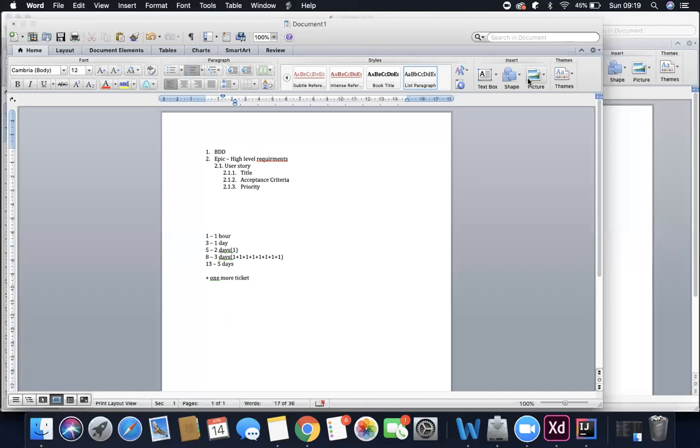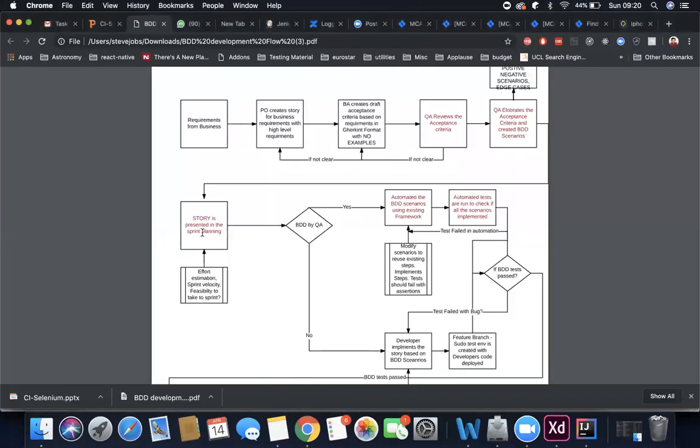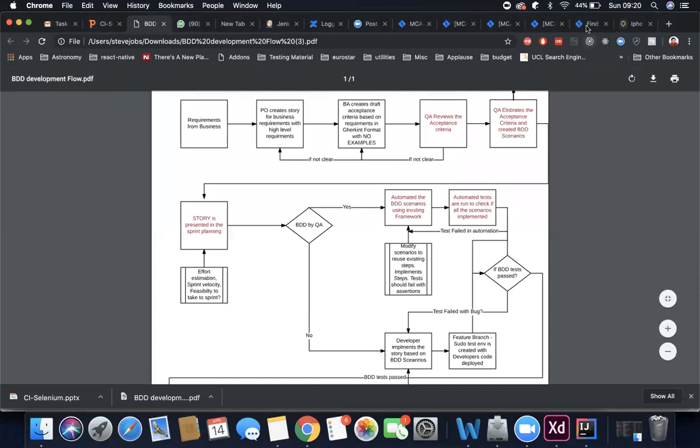Because in the sprint it is not only this, you will have other stories too, and typically a sprint cycle has 10 working days, meaning 2 weeks, isn't it? In these 2 weeks, this is taking 3 days, and keep in mind that you have to have something else. So the Scrum Master will decide whether we need to take this story in the sprint or not, because it's not just about giving an estimate. Once you give an estimate, not every story will go into the sprint.